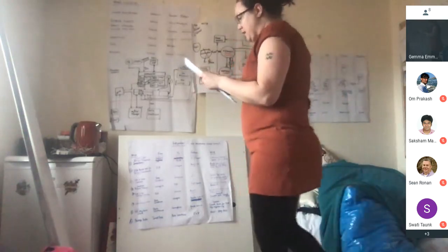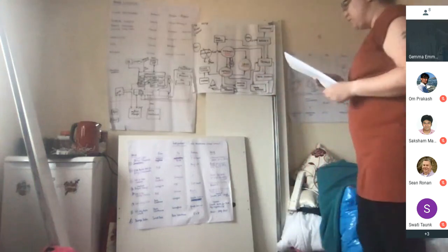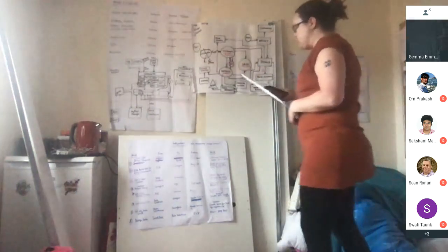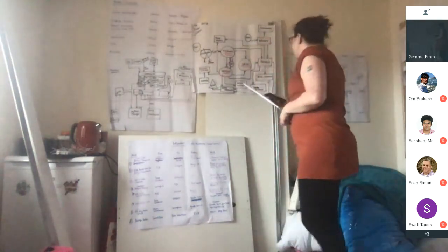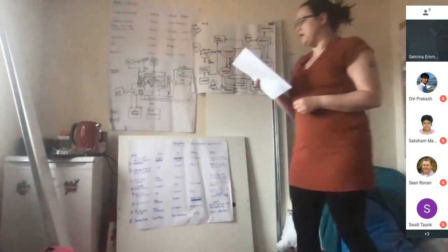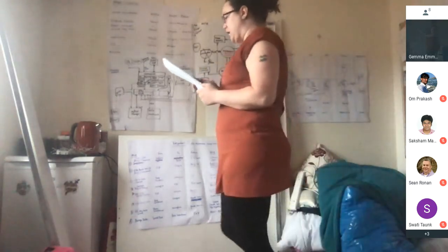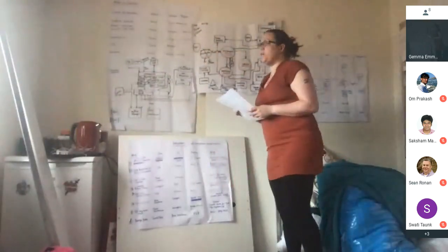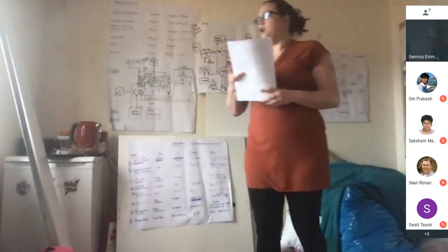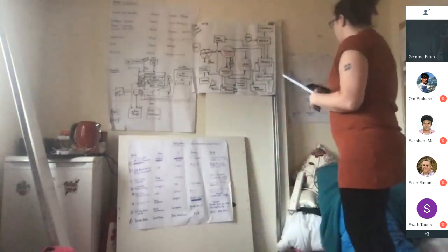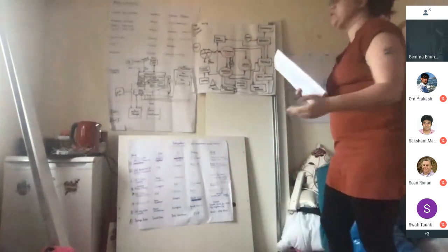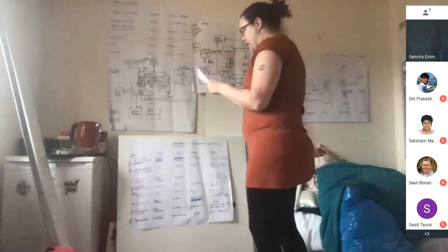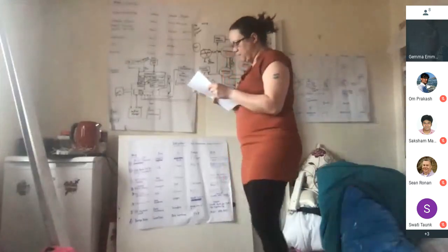If we're accepting any ideas on development, we need to trace it all the way through. So Jira will enable us to integrate with a version control and a CI tool to enable us to do that so that we can track. We want to release every month. So what I propose is an agile framework for developing our ideas, because of the fact that things will change so much and because we need to release monthly. So we need to make sure that we're shipping regularly.